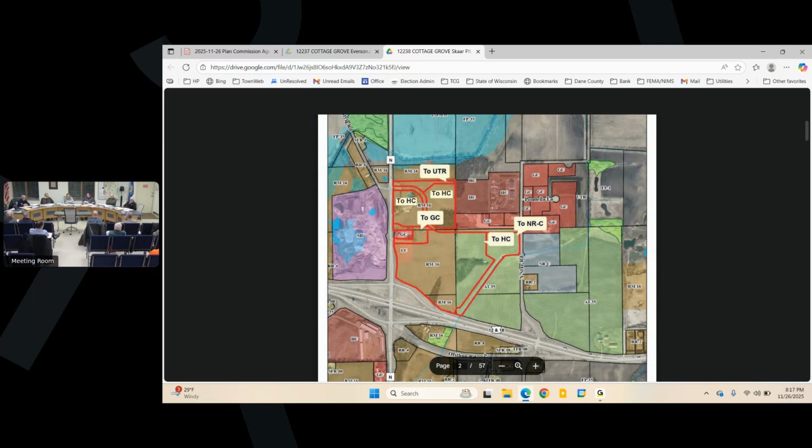I think Steve's new proposed site plan even showed coming out to this new road. Yeah, that's right. Correct. And I think the only thing that comes to mind from stuff learned in the past was just making sure that whatever you guys design, for instance, the stormwater, when it comes to maintenance on that, that it's all in the deed, that everyone in those lots is responsible. That anybody that feeds into that is responsible for it.